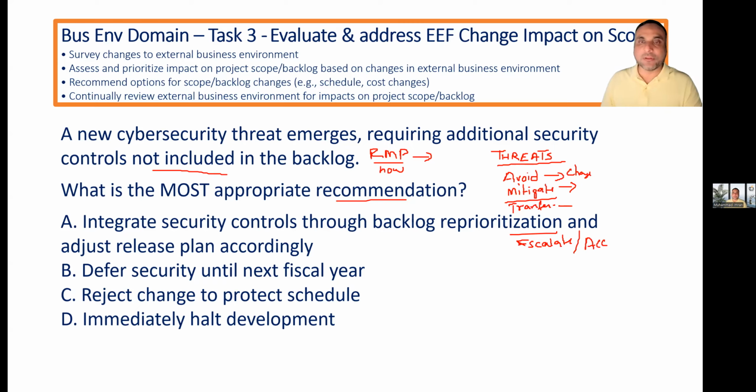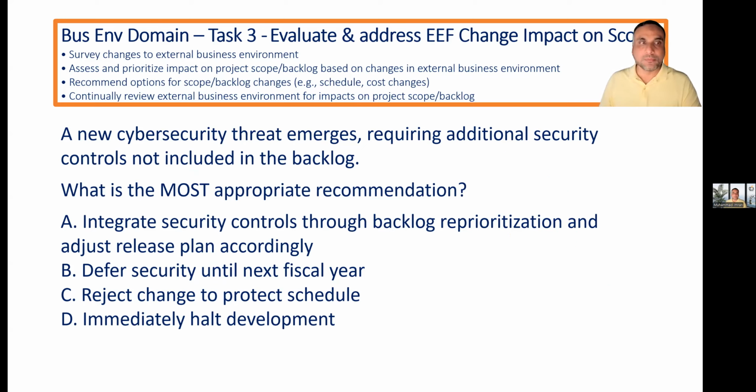or accept the risk. When we accept the risk, we have two: active acceptance, which means we acknowledge the risk and we allocate contingency reserves, or it could be passive acceptance. We know that's very low probability, so we will handle it with the workarounds, which will be funded by the management reserve. Now you have the revision of risk also for this. Please answer the question. Exactly. A is better answer.